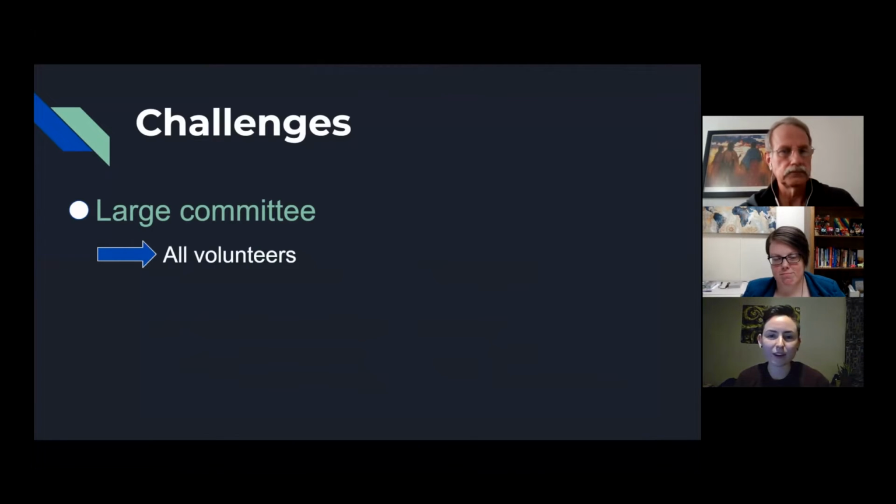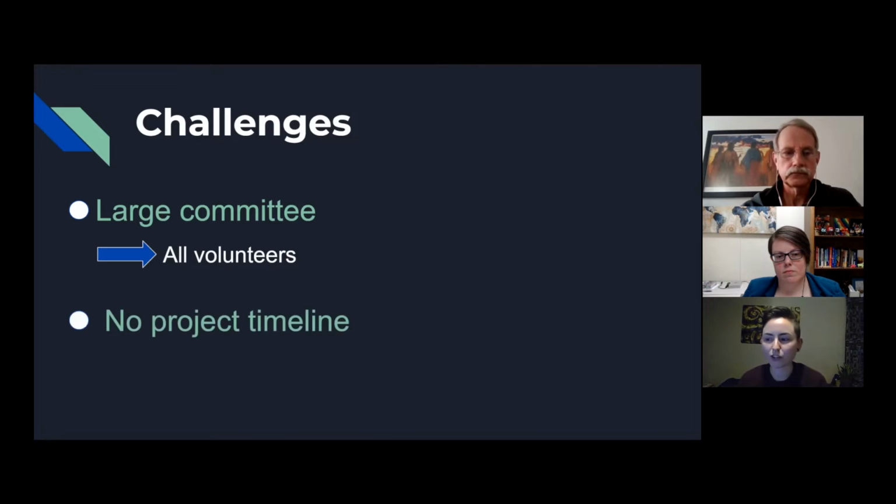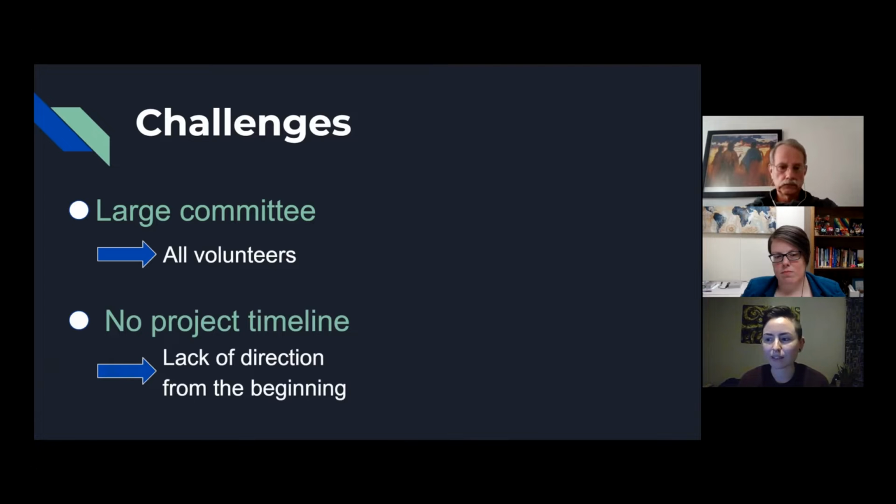So not only was it complicated to find meeting times that worked for everyone, along with having productive conversations over the many, many details that come along with the website redesign project, we also had other priorities and responsibilities that made it challenging to really dedicate our time to this project. Another major challenge that revealed itself was the lack of a project timeline from the beginning of the process. This made it really easy to put off meeting times and decision-making without having a solid finish line in place.